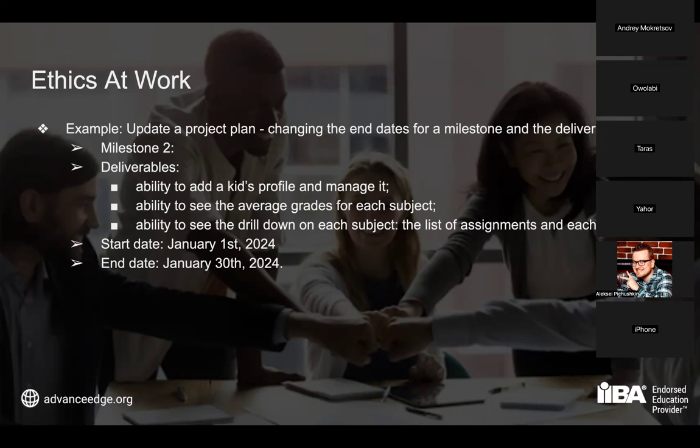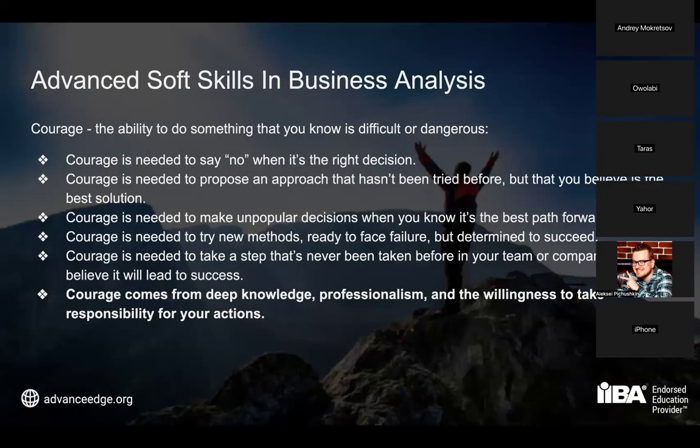So for me, acting in accordance with my values, honesty and transparency, I wouldn't just remove, I would strike through, write updated with today's date, and add the new values or new items, right? And I would also immediately notify my stakeholders in the most relevant way that is accepted and agreed by all stakeholders in our project, whether it is email, Slack, Microsoft Teams, or whatever the tool is, right? This is how acting in accordance with your values can also help you build better collaboration and relationships with your stakeholders. And the last thing that I have here is courage.